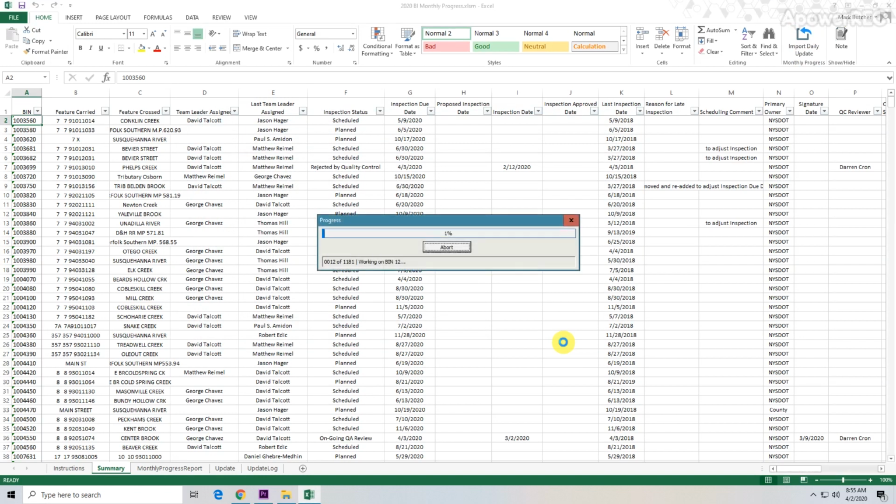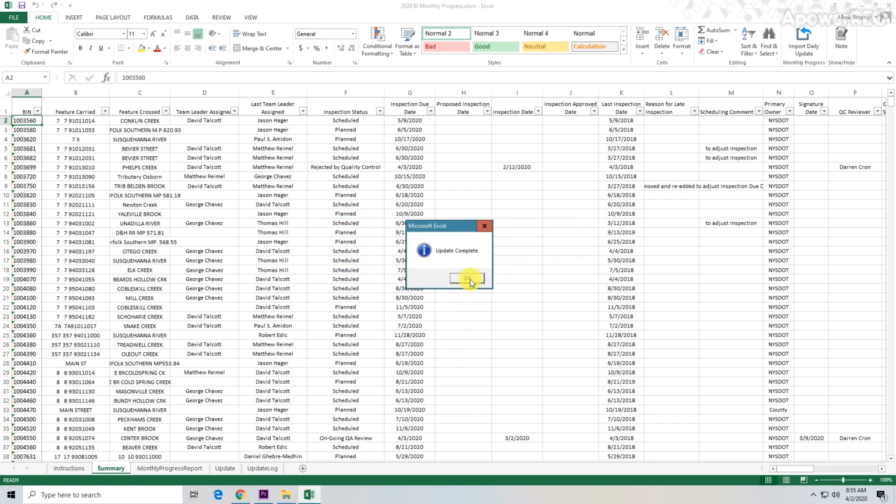Now you're probably wondering why we're capturing data on a daily basis out of Vitas and importing it into the spreadsheet. And that really has to do with the way Vitas handles some dates of submissions. As you go through the process, sometimes the dates are overwritten or dates get blanked out. And so we want to be able to capture those initial dates of submission to QC, QA, inventory submission dates, etc. And so that's the reason for the daily updates and the daily downloads.